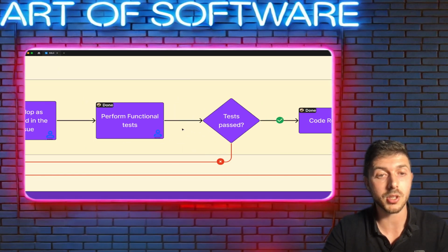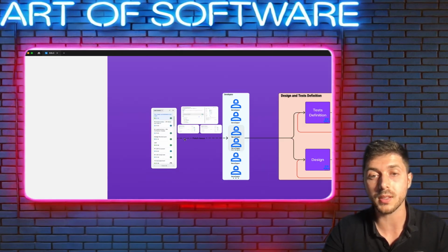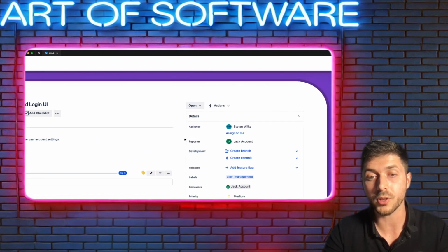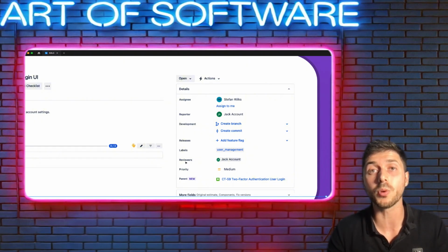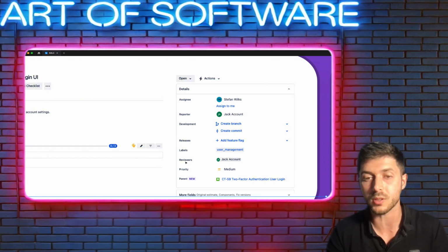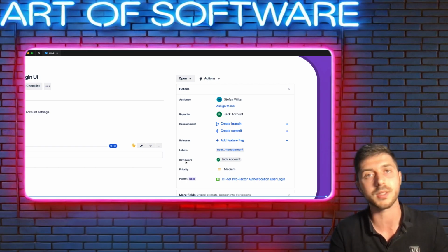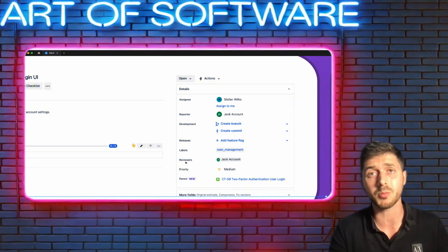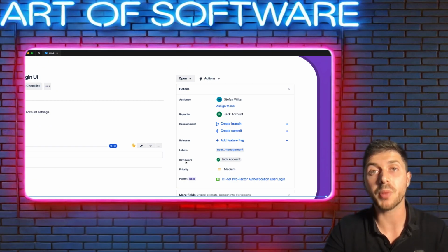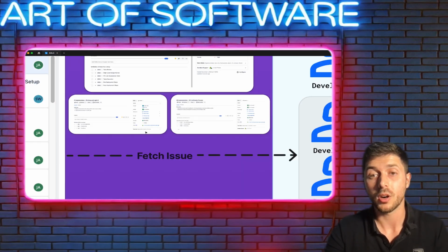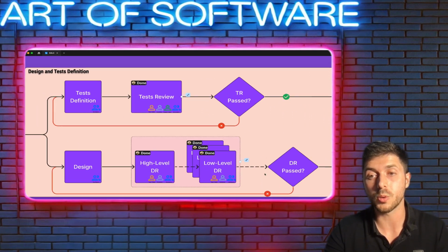And now I didn't actually mention it before, but as you can see in the tasks, we also have here in Jira, a reviewers column. So we also must define the reviewers in the sprint planning. Now there are pros and cons if we want to define it as a column in Jira or as a subtask with estimation. We can discuss about it later. Anyway, the reviewers have to be defined in sprint planning and be part of the developers to join also the reviews here. Alright, let's go back here.